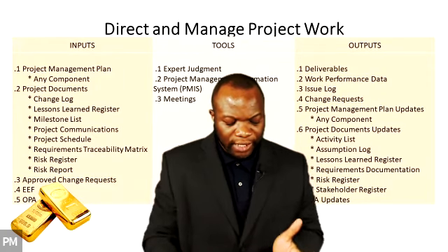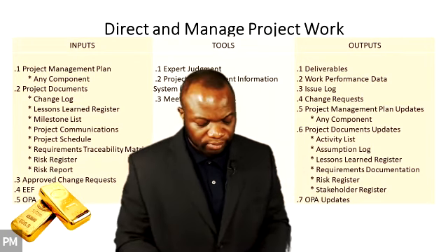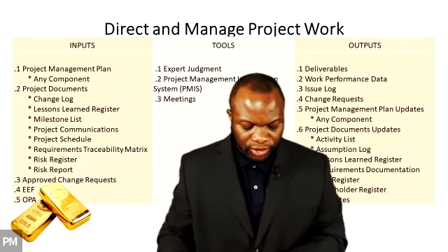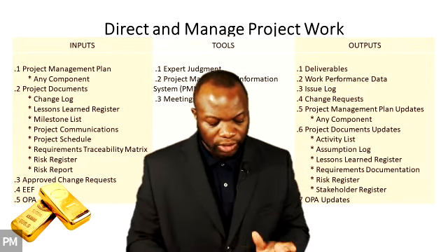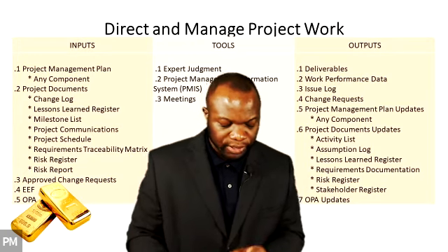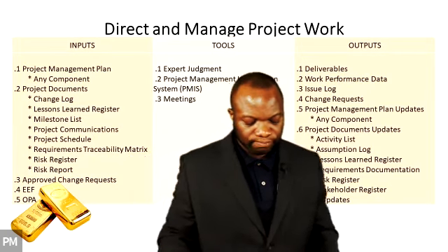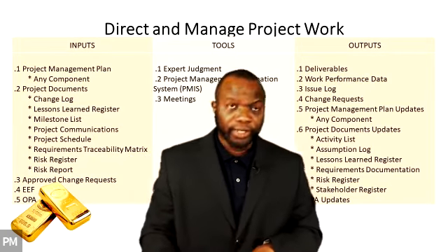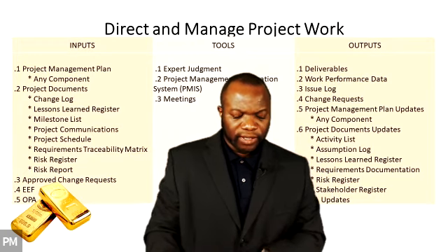It then says change control should be applied once the first version of a deliverable has been completed. The control of the multiple versions or editions of a deliverable, that is documents, software, building blocks, is supported by configuration management tools and procedures. So that's a big one. Understanding what deliverables are, that's the beginning.